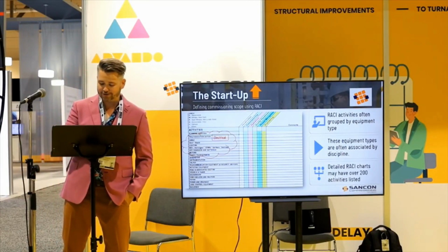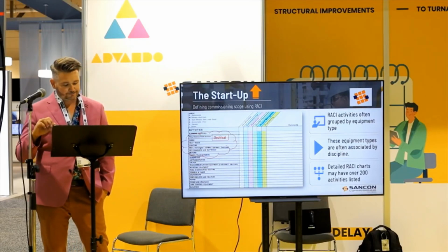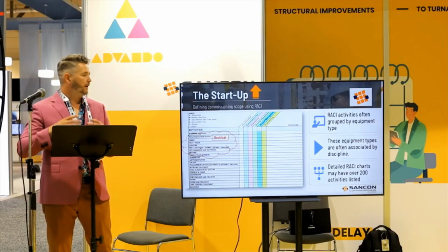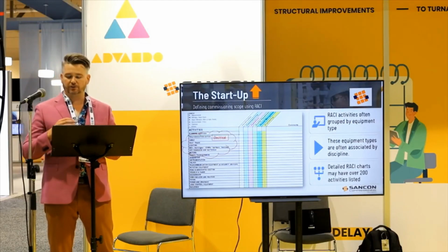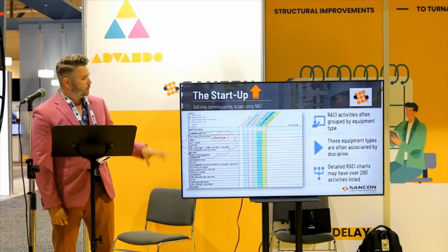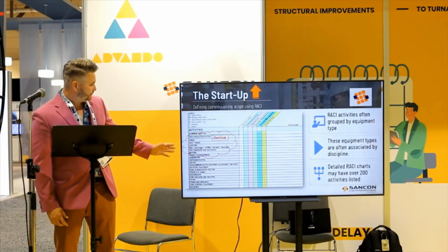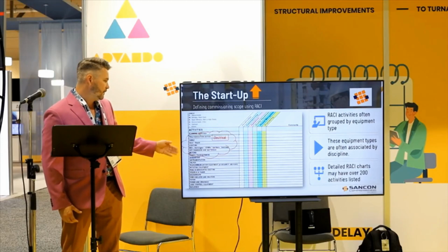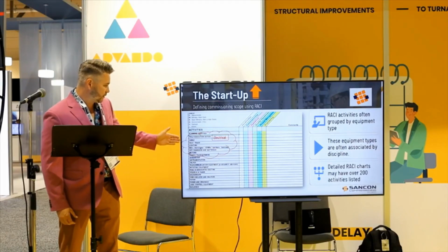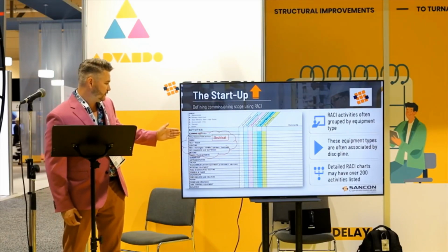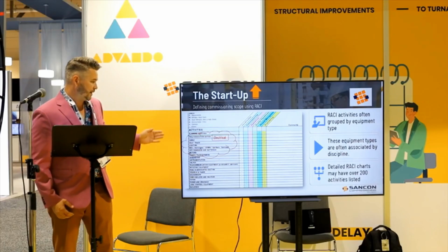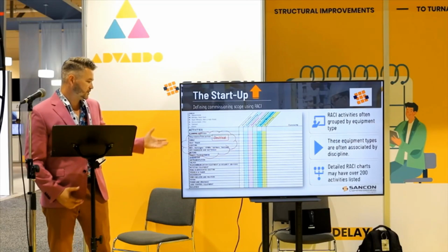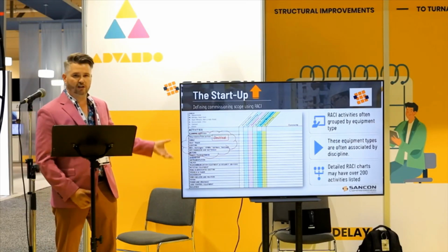It's all good. So next slide here, we're going to look at a RACI, and we're going to build out a small piece of a responsibility matrix here. So what we've done here, you can see on the screen, is essentially some electrical scope of work. So we have our planning services, so we know our field execution duties, our cable tray installs, heat tracing, lighting, MCC switchgears, UPS charger stations, motors, and this can be tailored to fit any project.